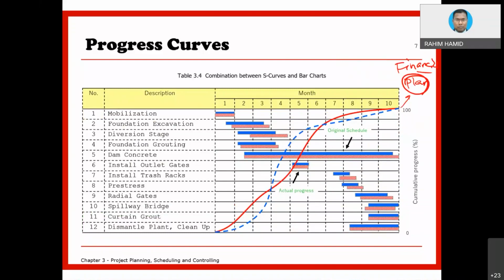You see, for this project, for the first 3 weeks, it looks like the progress is quite slow. And how do you plot this graph? It is through the process of tracking or monitoring. Remember, I mentioned to you, tracking and monitoring is the process of getting the information. Once you get information, you can put it into a graph or whatever so that you understand. But the most important thing, the second step, is taking action. Taking action is basically control. You do not want your project to slip further and further. You need to catch up.